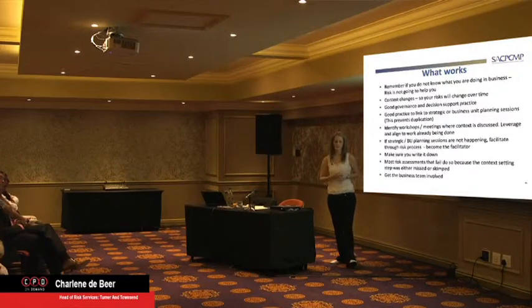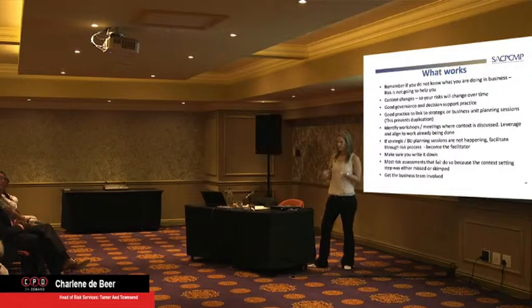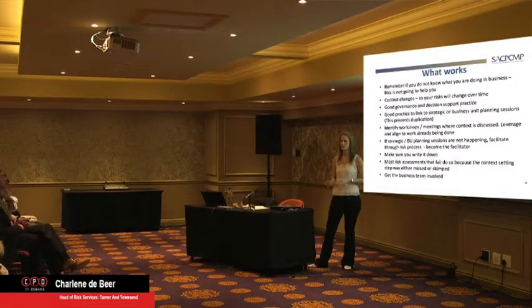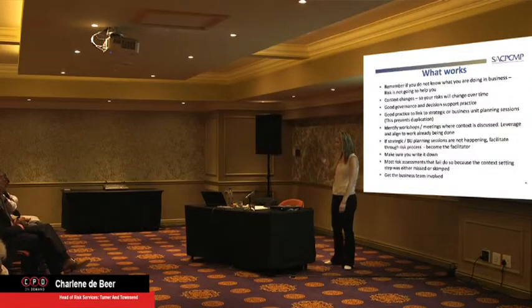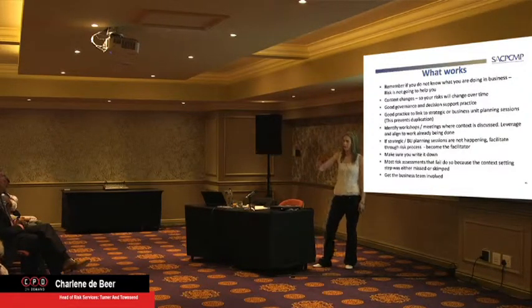It's not a lot of admin work. It's just, if we make sure that this week we slipped 5 hours, the recovery Saturday we're working 5 hours, done and dusted, or they're maybe not as productive on a Saturday, so we need to work 8 hours to get the physical 5 hours. We can manage it as we go along. But a lot of people think risk is a stick.